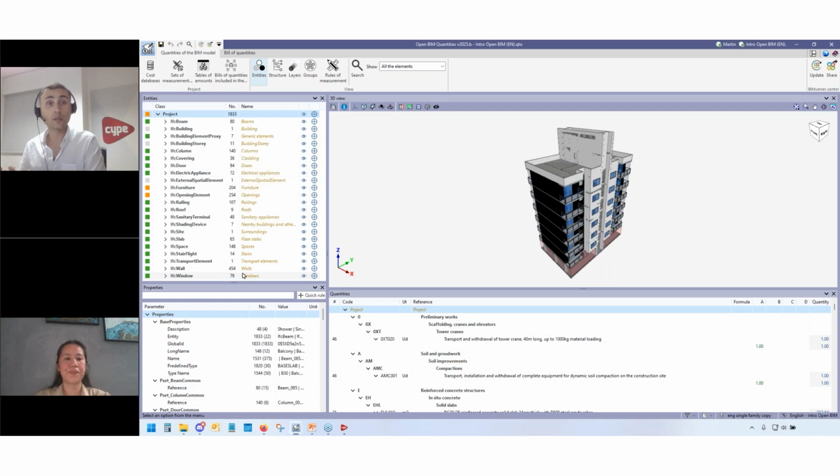So that's one thing. But another relevant issue is that if the project is changed, if the geometry of the building is modified during the project, all those changes are updated automatically. I don't have to work again in order to get the measured elements with their prices each time the project changes. It's just updating information, and now we get it automatically. So we no longer have to manually measure if we don't wish to, and we no longer have to be modifying all this work each time the project changes. That was for the second question that you had. So I'll go ahead and show an example and maybe a little bit of how we use it, the key steps in order to do this, right? Yeah.